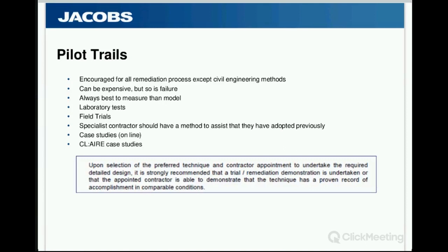Pilot trials. Virtually every project I've ever done has had a pilot trial. They're absolutely essential for almost all remediation processes, with the exception of civil engineering based processes. The amount of factors that need to be taken into account with regard to chemical fate and transport in the subsurface are quite complex. And it's always better to measure than to model.